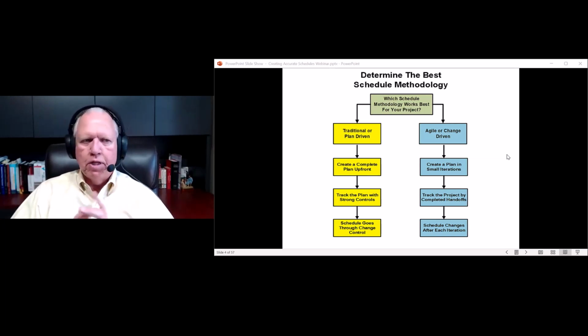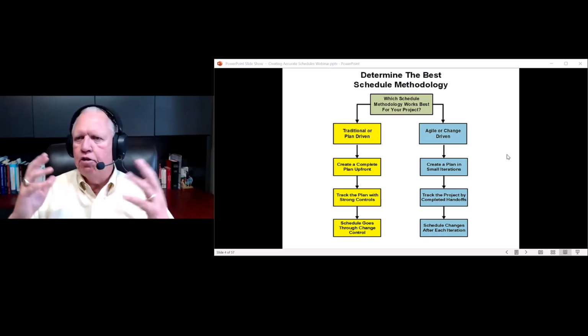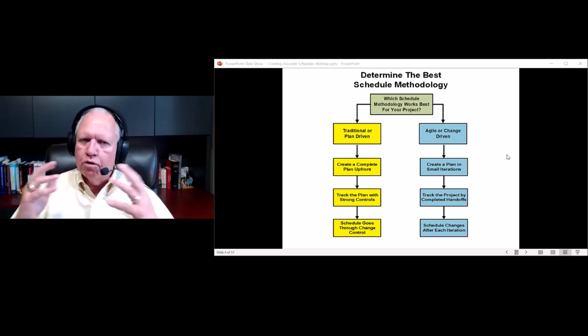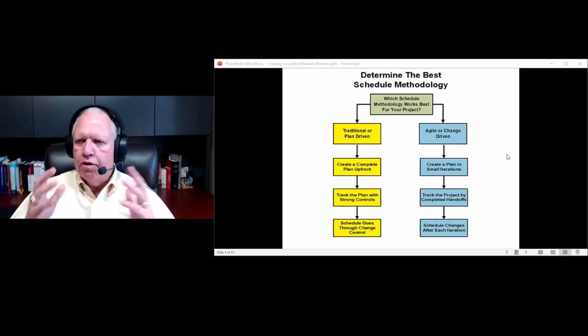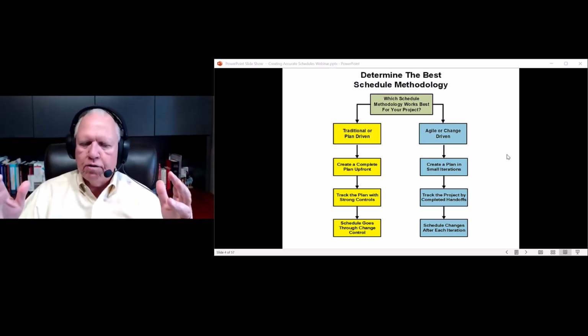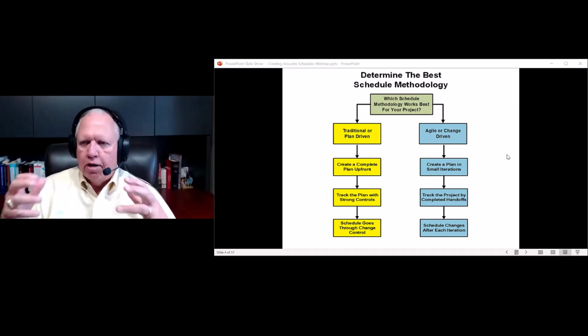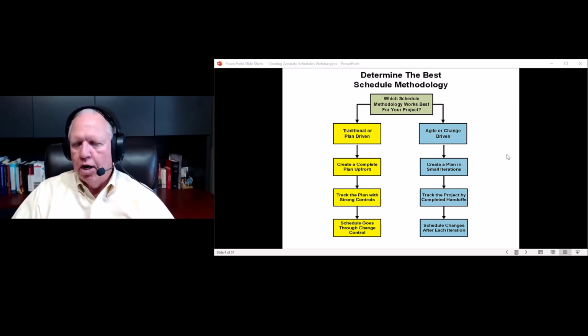And the reason for some of this is because sometimes what we describe, we've never done before. It's brand new. It could be new technology, new product, new direction. And so we're trying to do something we've never done before. Then you're tracking the project progress through these iterations or through these sprints. You're handing something off every 3 or 4 weeks. Every 4 or 5 sprints, you've delivered a release to that customer, and the customer is getting more and more functionality or more value each and every iteration.